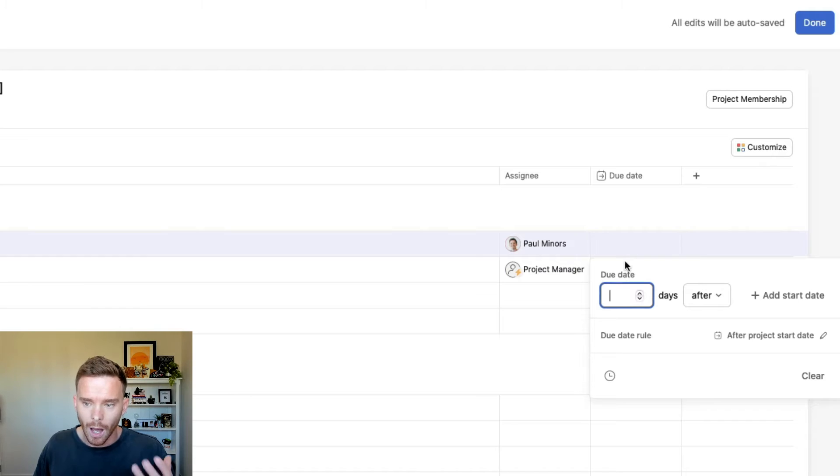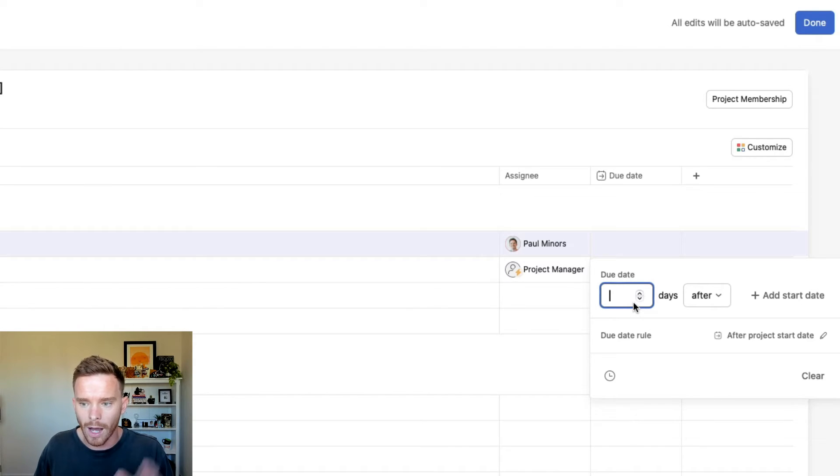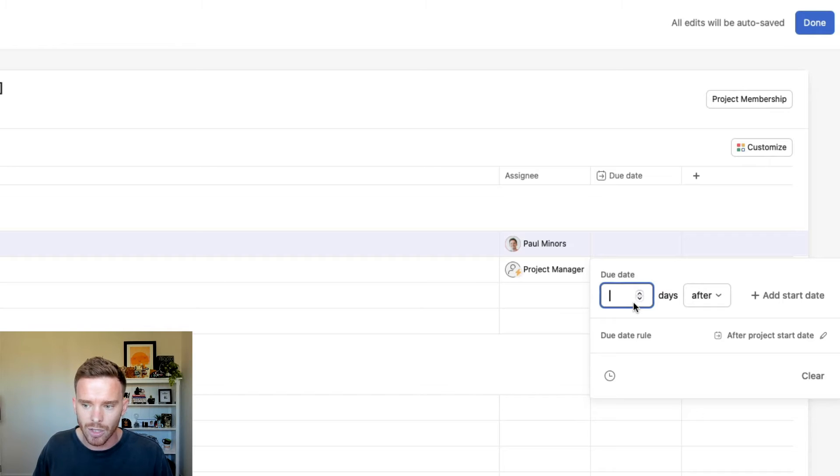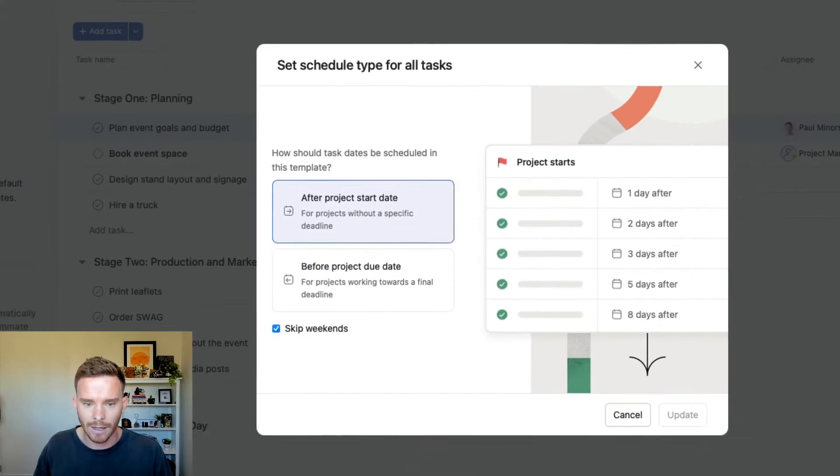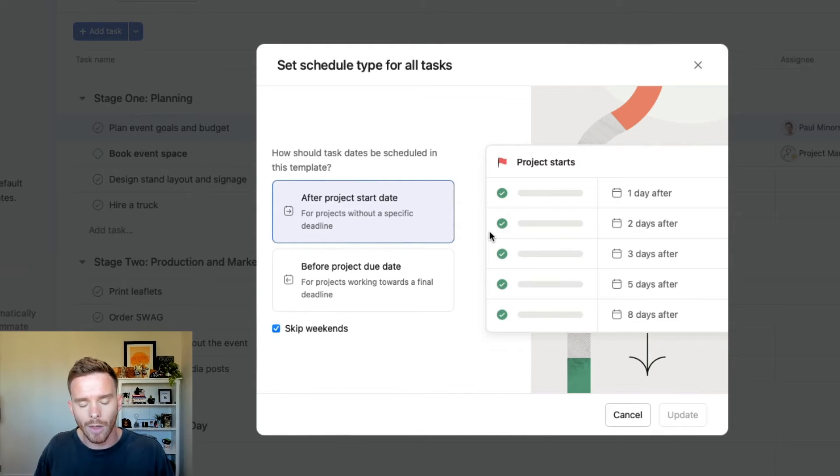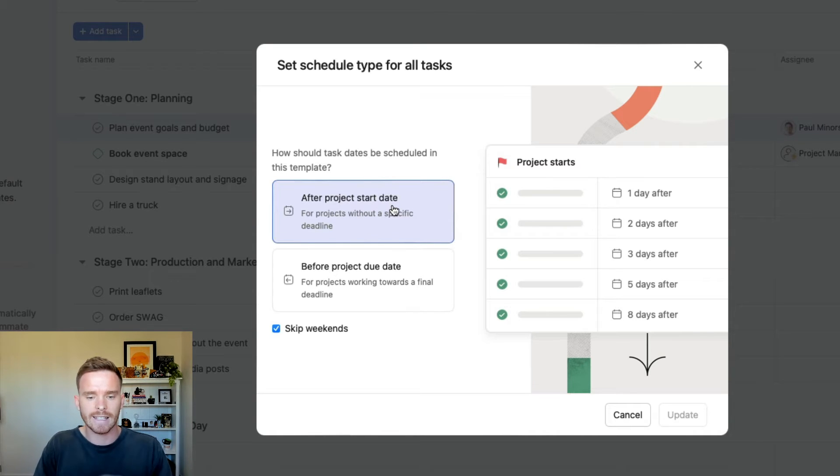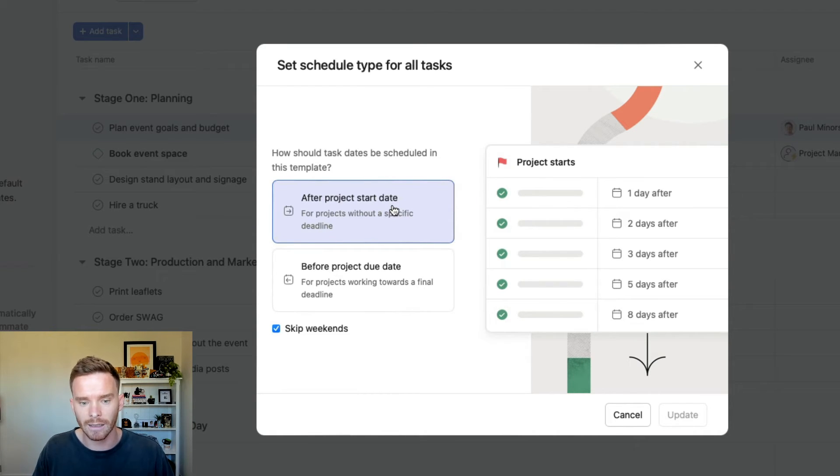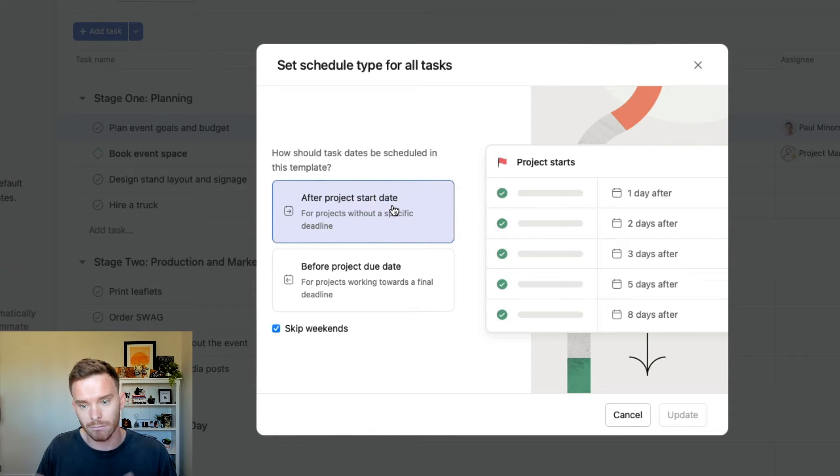With my due dates, I can assign tasks to be due a certain number of days before or after either the start date or the due date of the project. So when I create my template, the first thing I actually need to decide is, is this template, are the tasks in this template going to correspond to a start date where, let's say the project is starting today, a task might be due one day after the start date, which would be tomorrow.